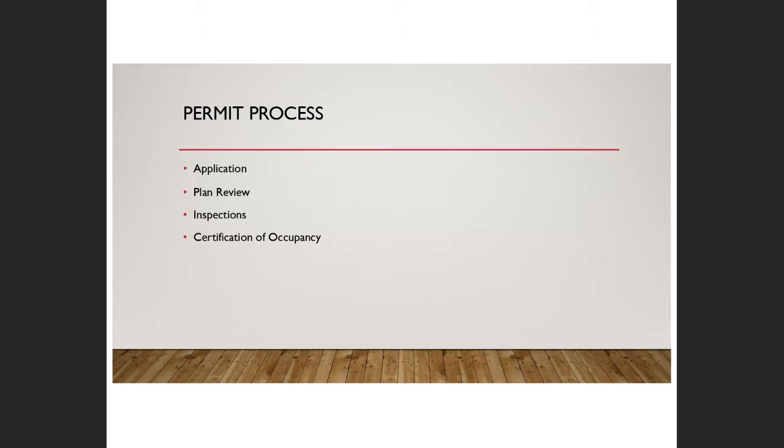And again, once the permit, or the permission to work, is issued, there'll be inspections. Then, depending on the nature of the work being done, the final step would be a certificate of occupancy. If you're building a new building, certainly a commercial building, generally speaking, at the end of the process the building will be inspected again.